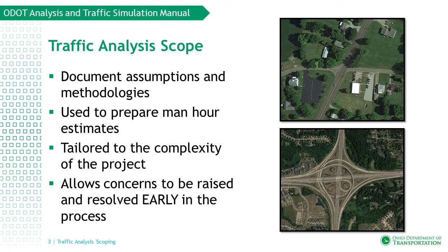The scope should also be used to raise concerns and to resolve them early in the process. Some of these resolutions may lead to changes in the analysis, which can be accounted for in the scoping process prior to the fee development, which can prevent a fee modification later in the analysis.